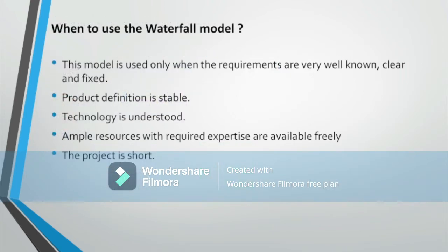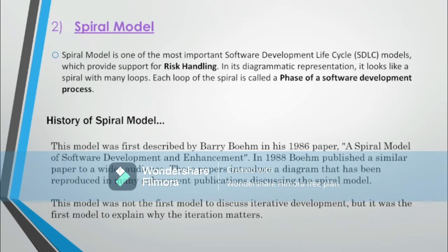When to use the waterfall model? This model is used only when the requirements are very well known, clear and fixed. Product definition is stable. Technology is understood. Ample resources with required expertise are available freely. The project is short. Second, I'm going to talk about the spiral model.